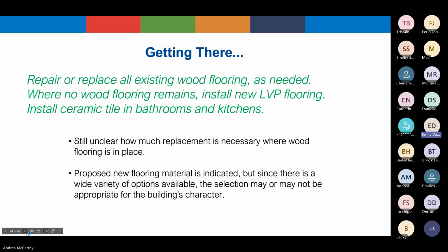Here, the work description has been fleshed out a little more, reading: "Repair or replace all existing wood flooring as needed. Where no wood flooring remains, install new LVP, or luxury vinyl plank, flooring. Install ceramic tile in bathrooms and kitchens." The material of the existing flooring is given, as well as the material of the new flooring that is proposed.